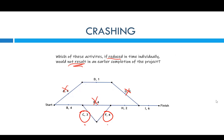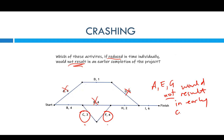To write an answer for this: A, E, and G would not result in early completion. Because they ask which of these, if reduced in time individually, would not result in earlier completion of the project — A, E, and G would not result in early completion of this project.